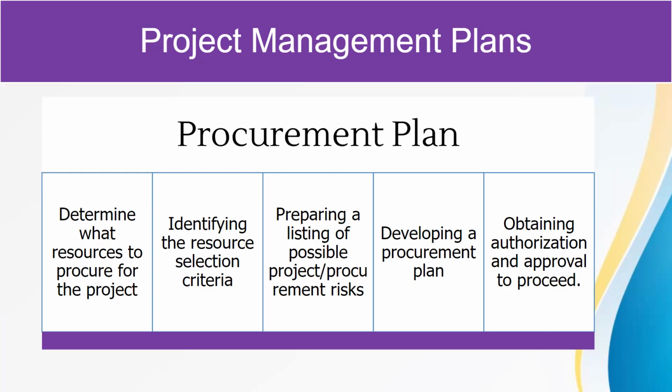Developing a procurement plan will cover, like I said, what are the items you need: materials, goods, or services, works, equipment. What do you need? Define the items. You also need to come up with clear specifications, right? And then you also need to come up with the cost. How much do you want to spend on it? Or what's the budget for it? Also need to come up with the quantity. How much of it do you need? Who is going to use it? When do you need to procure it? Those are very important things to determine.